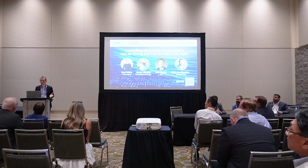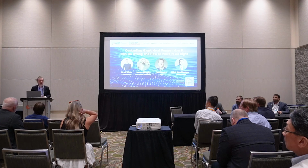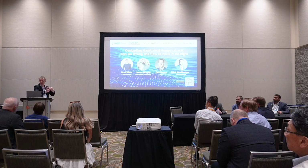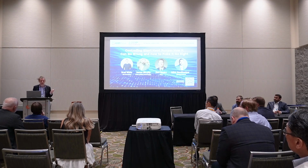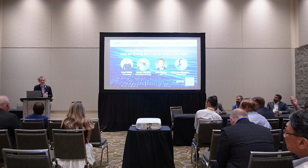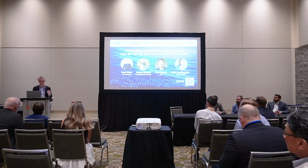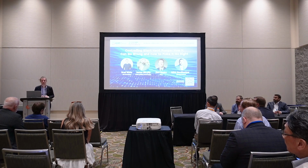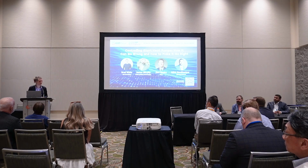So they had no idea what they were trying to achieve with this $500,000, very sophisticated system. So of course we were missing each other, and they weren't really getting the problems that I was bringing to the table because they didn't understand what it was for. That was a really good lesson for me. As part of the project kickoff, I need to go through what the intent of this project is and how it should operate. And I think that'll help solve a lot of these issues. But yeah, that's the kind of thing you run into because it's new stuff and people aren't automatically going to be on the same page.